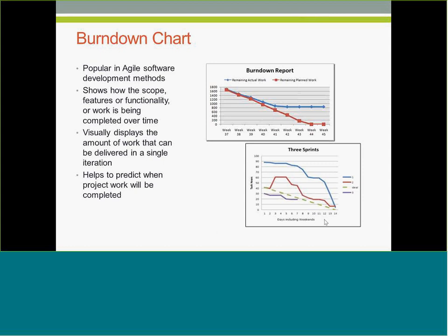And burndown reports are also very popular for waterfall projects because they will show you the number of tasks to be completed, or the percentage of work to be completed or currently completed, or the percentage of funding used, or both, or all these curves in one, right? So as we talk about our status report mix,